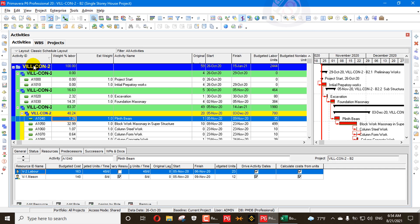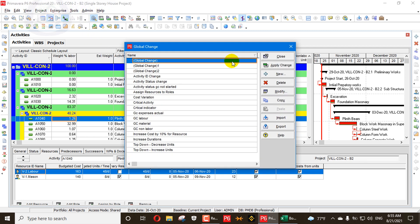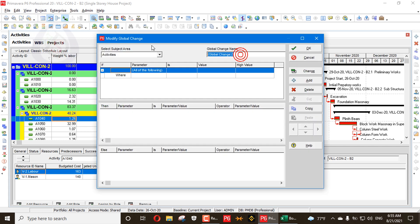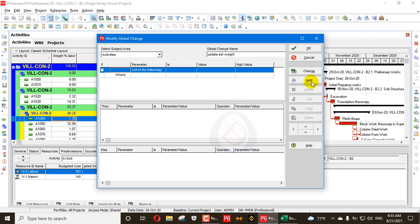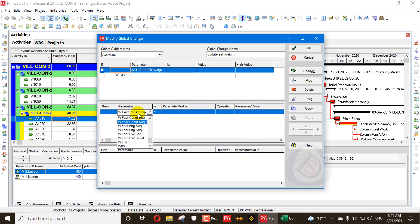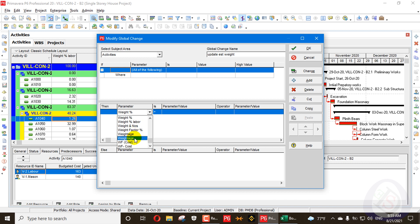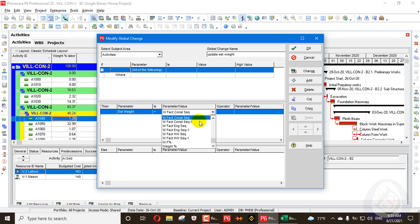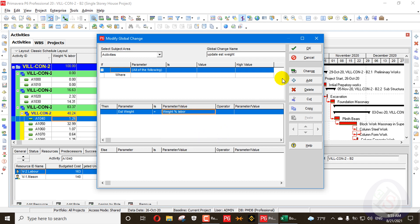The activities have the imported weight percent labor values, but they are not yet updated in the Estimate Weightage column — that is the star value column which cannot be updated directly as I mentioned. So we'll use Global Change. I'll create a global change called 'Update Estimate Weightage', and set Estimate Weightage equal to Weight Percent Labor.